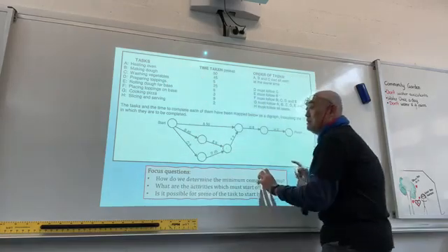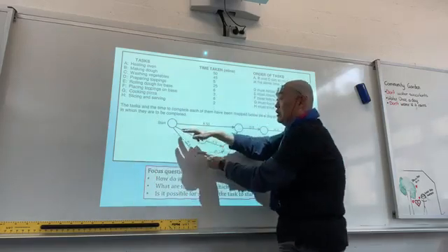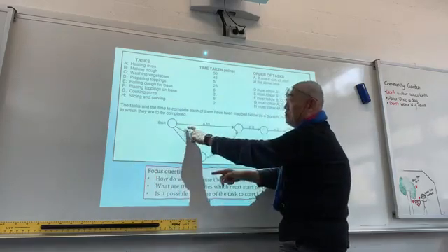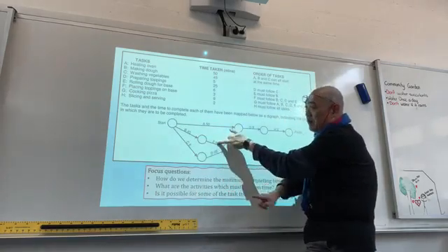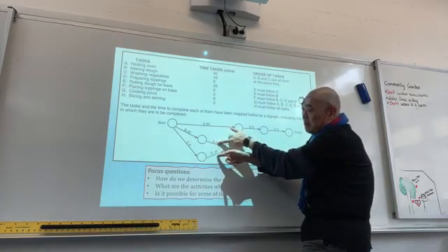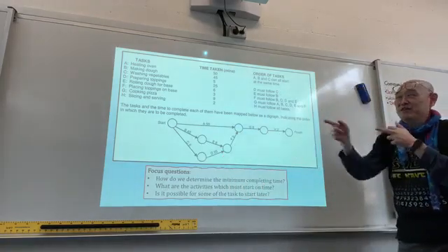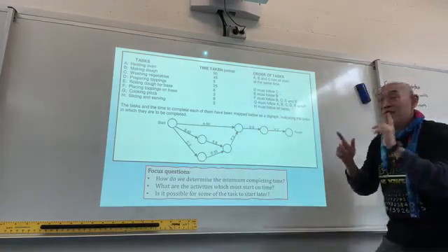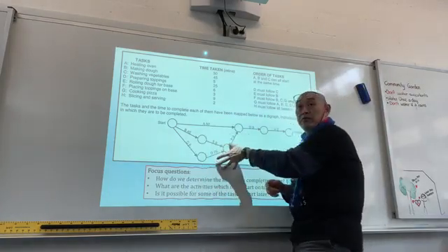So the sequence is, you can do this at the same time, in parallel: making dough, washing vegetables, and then rolling the dough and preparing topping at the same time. Not that you can split yourself into two in doing both, but you should show this as a project network because this is how it will go.